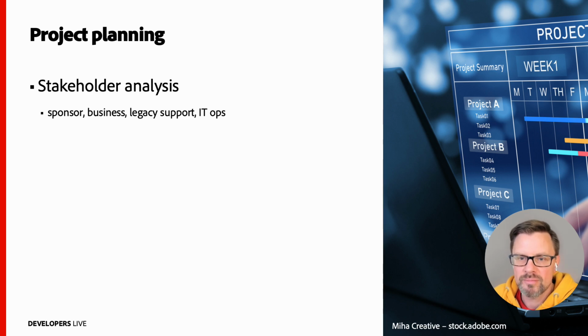For migration, you must get some sort of backend access to the legacy system to extract the binary and metadata. Identify who technically owns and supports that system and make sure they are available throughout the whole project.